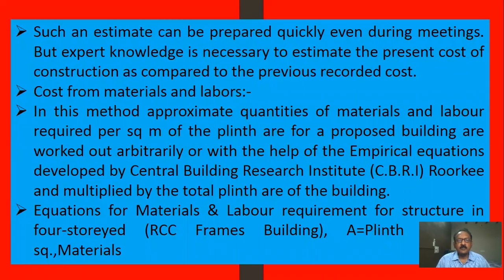What is the difference? You can compare the present cost with the previous record cost. There is a possibility of material costs increasing, like cement may increase, and labor rates also vary year by year. This is important in the approximate cost method, the comparison cost method.